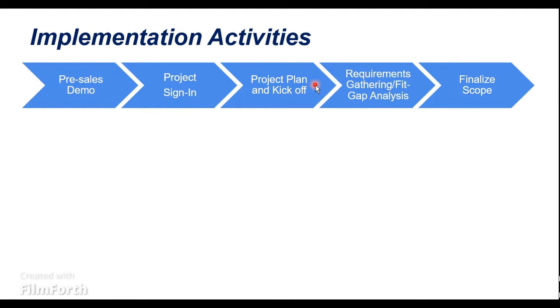And once we have the project plan finalized, we are going to arrange a kickoff meeting with the customer and the business heads, saying that, based on the agreement on the project plan, we are going to initiate the project. So once the kickoff has been done on the project, the next step is to perform the fit gap analysis